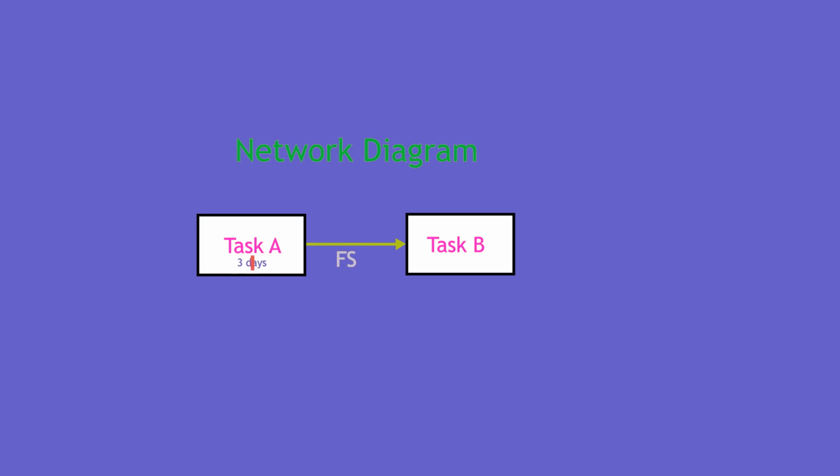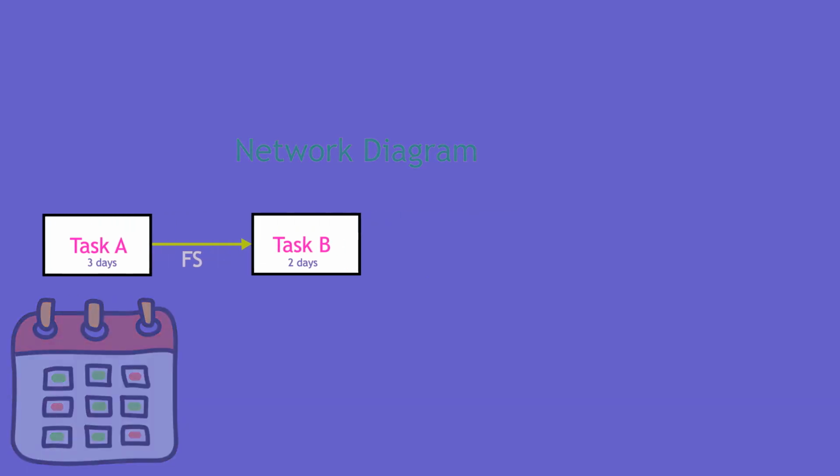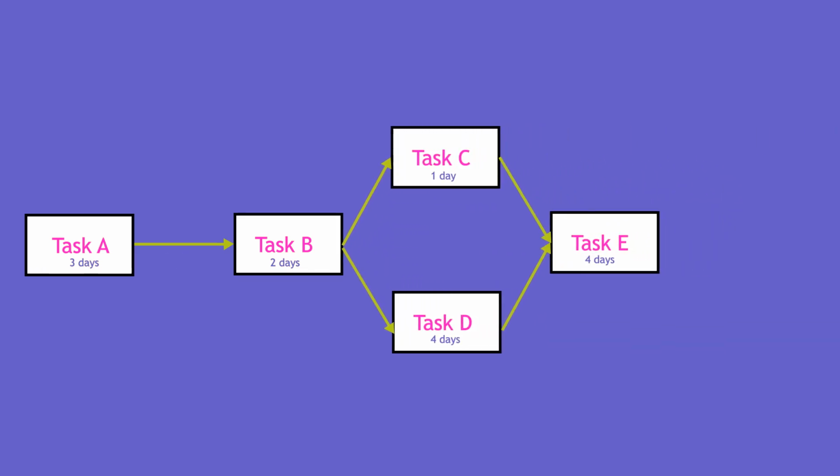Each activity has an estimated duration, the amount of time that the work is expected to take. There is also a project calendar that informs the scheduling engine the days and times that are considered to be working time. Everything else is non-working time. We'll fill in our schedule with a few more activities. Now, the scheduling engine needs one more piece of information: when that first activity can begin.